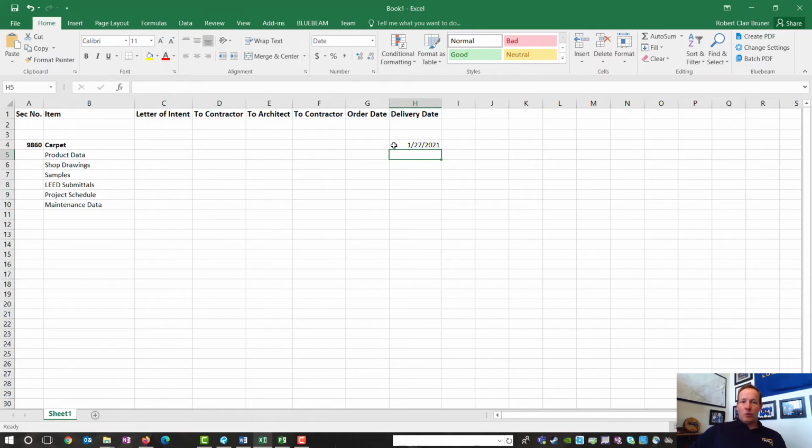Now, we're going to go backwards through this list. Your order date: the difference between your order date and the delivery date is going to be your lead time. This is going to vary for all of your different materials.